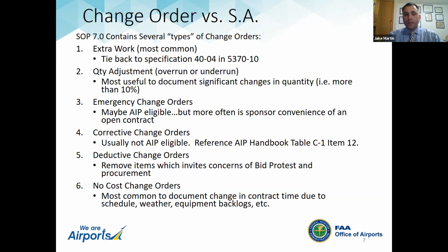It's not necessarily additional quantity, but it might be you've reached final completion and something happened after the contractor demobilized from the site and they have to come back to the site to fix something. It wasn't a mistake or anything. It just, something else came up. And so that's kind of an extra work case because they've already demobilized from the site.